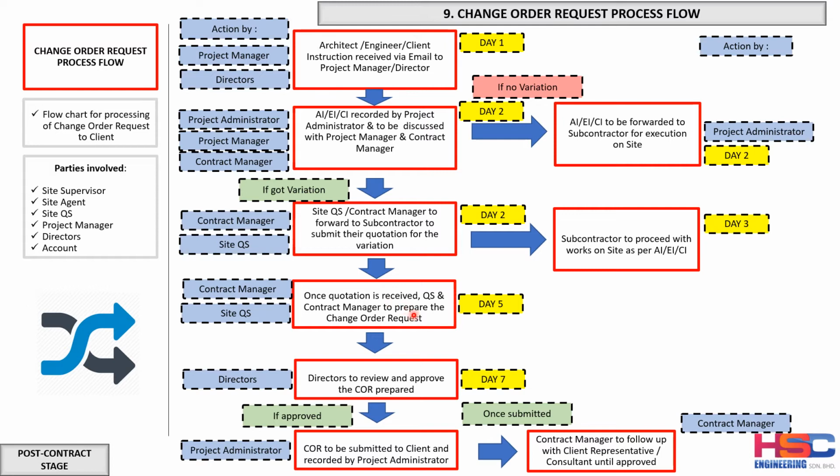They can choose to do it while waiting for approval. But they also have the right to choose not to do the variation yet, and proceed with their current contract work. But this is for the project manager and the contract manager to discuss with the subcontractor, because this new requirement may affect the current contractual work.